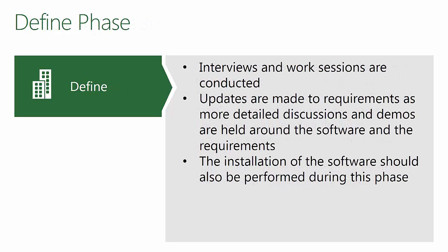The define phase allows you to take those rough requirements and build them out into hard requirements by interviewing certain personnel — different managers, project managers, and departmental heads. This will allow you to define the actual configuration settings that will go into the tool, like custom fields, views, and reports.